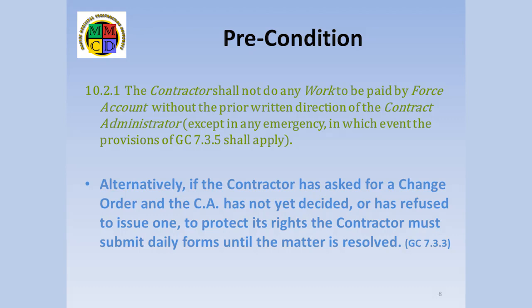GC 10.2.1 says, the contractor shall not do any work to be paid by force account without the prior written direction of the contract administrator, except in any emergency. Nevertheless, there may be three other reasons for proceeding without the change order.